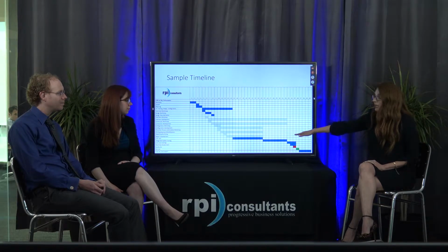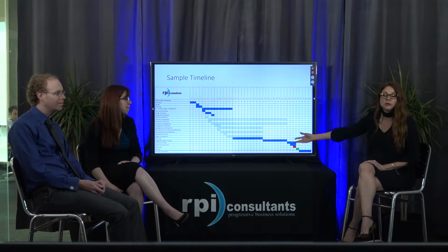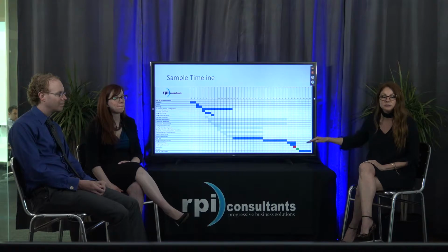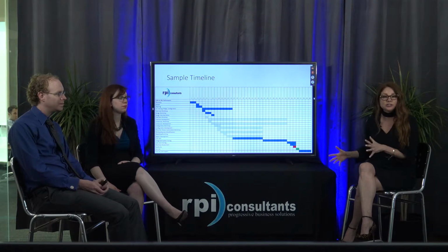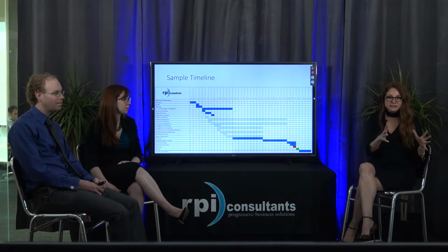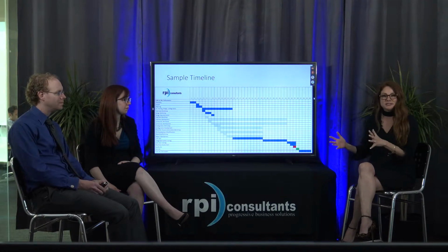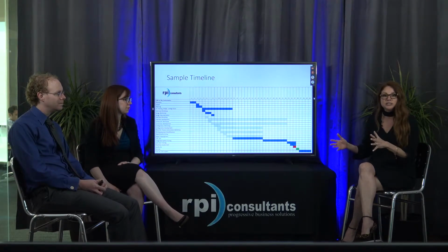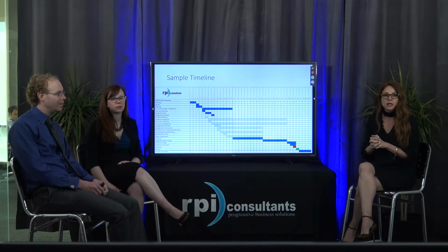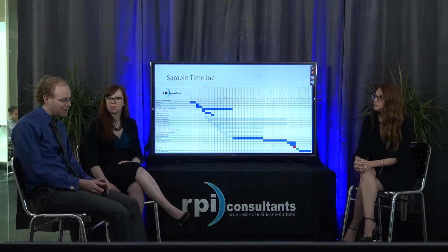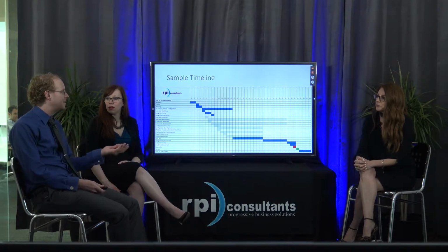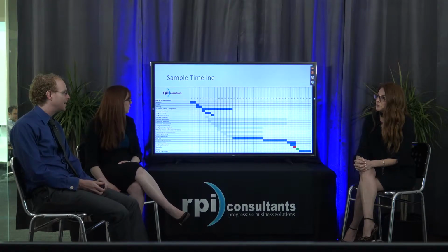We don't have it defined on here, but a payroll parallel or 3 is very, very important to make sure you plan for timing in your testing. You're not doing payroll, but you are taking data that feeds payroll. So you really need to ensure that you've done a few cycles of payroll parallels to sign off on that go live. So big picture here, I see this sample timeline is just under a year, maybe 9 months.